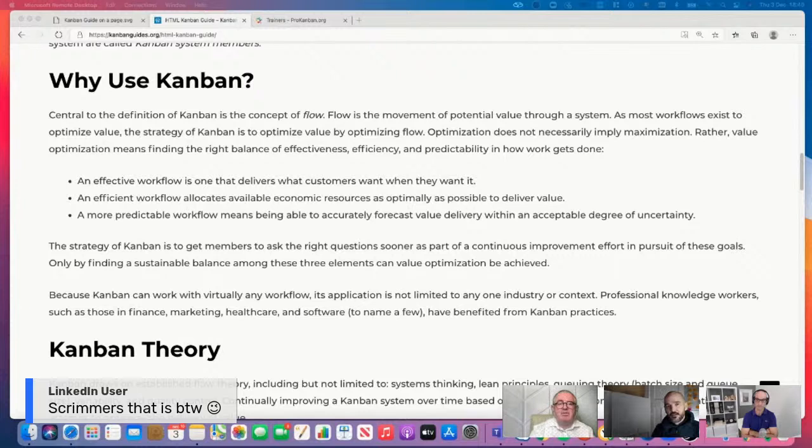Limiting work in progress, for example, controlling work in progress, is a very, very difficult thing to do. So some people might think that's a bit mechanistic, but when they see the benefits of the improved flow and the calmness that I see with teams who have optimized their flow, they're getting more stuff done, everything's taking less time, they can actually have conversations with people. It's like night and day, and I think it's incredible, from a situation where they were completely overwhelmed with work.